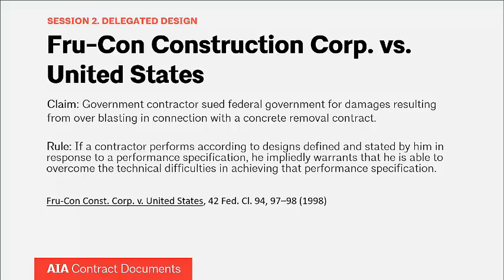As you can imagine, a performance specification is far less likely to get a Spearin warranty of adequacy than a prescriptive specification, where the specification is actually specifying all of the blasting protocols that needed to be followed. The problem with the contractor's argument in this case, and I'll spare you reading through this entire case, is that it was pretty clear that the specification was performance in nature.